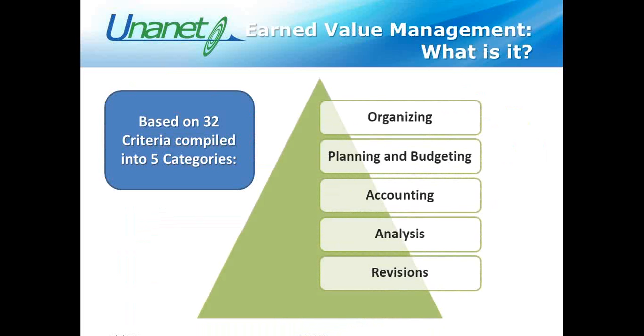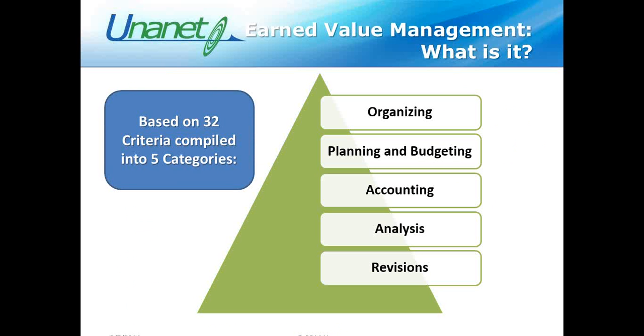And what these 5 categories do is they provide a structured set of management practices to establish something called a performance measurement baseline, a PMB, for a project, and then how you measure and analyze the achievement of that baseline over a given period of time. Now what this does, it provides greater visibility into how your projects, how your programs are performing. I'm going to talk about this over and over again, over a given period of time. It's how you're going to measure the performance of your project over that time frame.